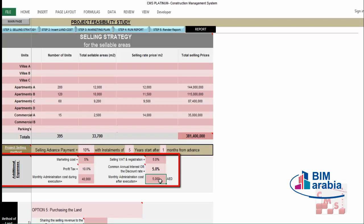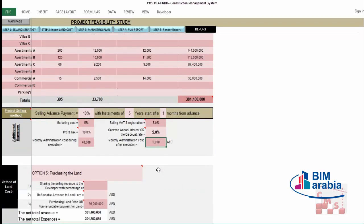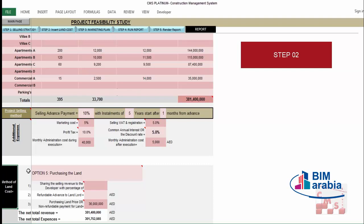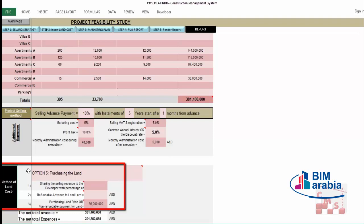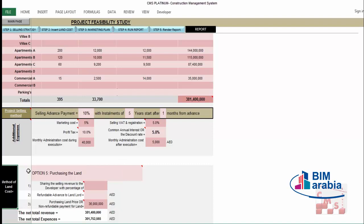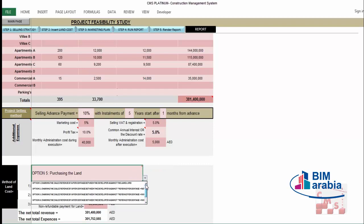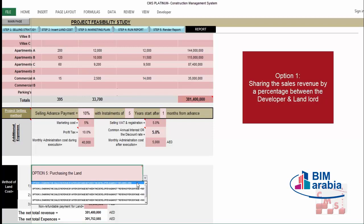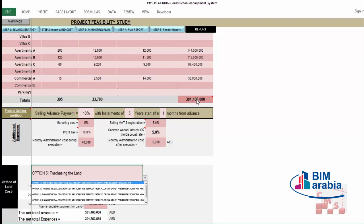Another important expense is the land cost. As a developer, you need land to set up your project. You can either purchase the land or share it with a landlord. There are several types of sharing arrangements between you and the landlord. CMS provides five options. The first option is sharing the sales revenue by a percentage between the developer and the landlord — meaning the total selling revenue is shared between you as a developer and the land lord.